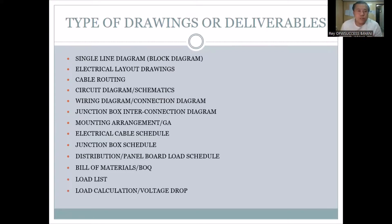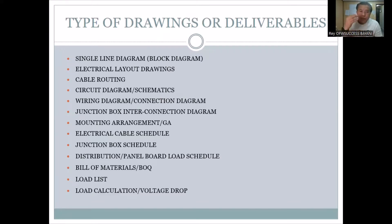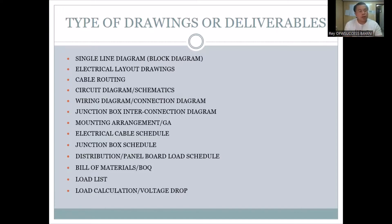These are the types of deliverables in our journey from feed engineering up to construction stage and also pre-commissioning and commissioning. When we say single line diagram, that is the primary key before everything else. You need the load from that. You'll know if all the protections you placed — circuit breakers, all of them — are calculated based on your load. Electrical layout drawings, cable routing — all of that — are basic requirements throughout our journey in construction, pre-comm, and commissioning.